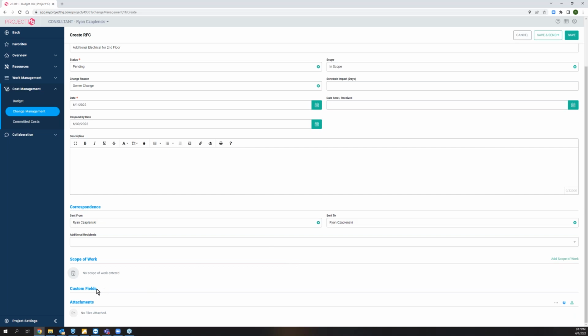All of our documents have these bottom sections here, custom fields. So if there's something missing or I want to add additional fields or maybe ask questions here, you can create additional custom fields here. And then there also is a spot where we can put attachments. So on change orders, maybe I am just doing the one that says totals only, and I'm printing a very basic cover sheet for my change order, but then maybe I attach a bunch of backup to that, right? Maybe we got pricing sheets and however we came up with that amount, and whatever you may need to show your customer, whoever's approving these, those things can be attached here to the change order. And if we email this, those attachments are going to be included in the body of the email.